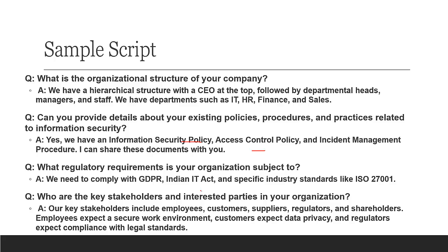It is a document which justifies the value of the ISMS project. This document includes the cost, the scope, and the context of ISMS implementation. So it's the first document that we submit to the management. Once they approve, only then will we create an ISMS scoping document.